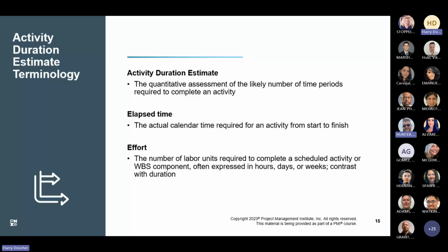So say you're working 5 days a week, it's going to take two work weeks to accomplish it. So you've got 5 days one week, 5 days another week, 2 calendar days in between those 2 weeks. So it's 12 days elapsed, while your duration would be 10 days.